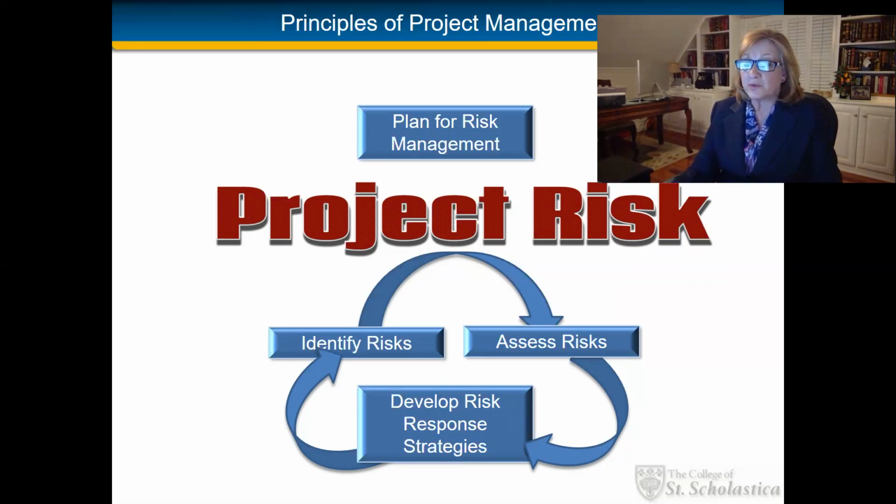There are various risk identification techniques that you may apply to any one project, and sometimes you need to use multiple risk identification tools and techniques. Some of the more common ones include assumptions analysis, using risk profiles, risk breakdown structures, and just good old-fashioned brainstorming. As risks are identified, there needs to be a thorough risk assessment.